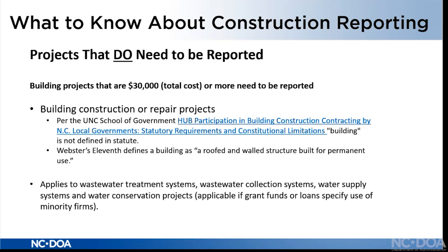And since it's not a walled and roofed structure, that is something that's a little bit of a gray area, where you could determine, yes, we're going to follow the rules for reaching out to hub vendors. We would encourage you to do that and to report. It's not statutorily required to do that. Some people might say, well, what about a park and you've got a shelter at the park? If you've got just a shelter with picnic tables under it, that's a gray area where you could ask, should I report it?